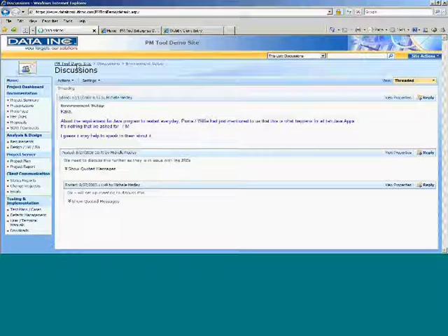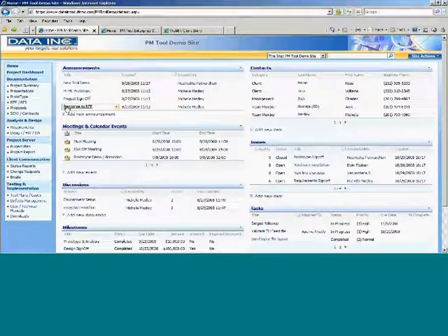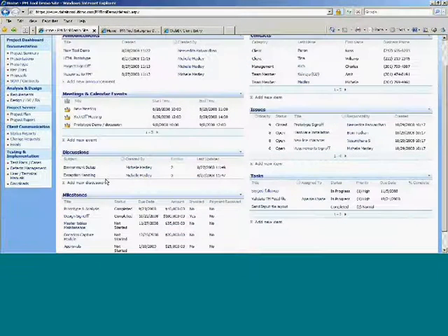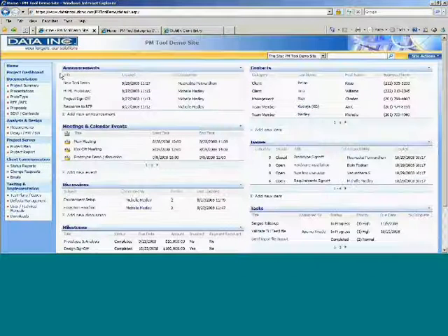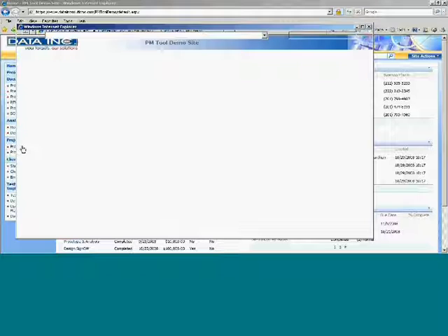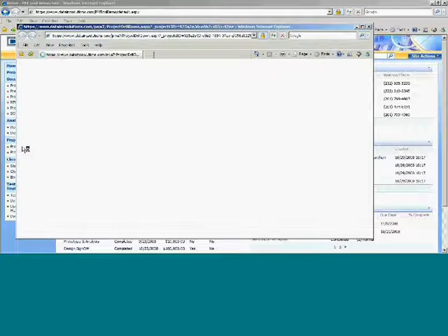Milestones, like I said earlier, are extracted from the project plan, and workflows and email notifications have been built in to integrate with the back office finance system. On the left side is the document repository, which covers all the phases of the SDL. It also has project planning, which can be accessed, like I said, using PWA, Project Web Access. The project manager has the option to open and edit this project plan using Microsoft Project Office.